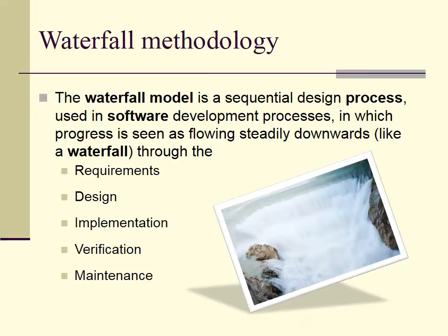So let's talk about the waterfall methodology. The waterfall methodology is the sequential design of software development or of any project, which goes from the top downward, from the requirement to the design to the implementation and verification and maintenance. So if the first stage is not completed, you cannot go to the second stage, and if the second is not completed, you cannot go to the third stage and onward.